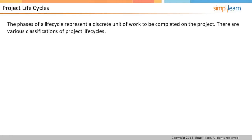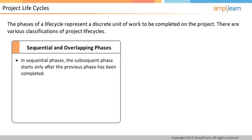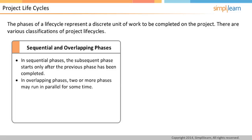A lifecycle is composed of phases. Each phase represents a discrete unit of work required to be done on the project. There are different ways of classifying project lifecycles. Let us first discuss sequential versus overlapping lifecycle. In sequential phases, the subsequent phase starts only after the previous phase has been completed, whereas in overlapping phases, two or more phases may run in parallel for some time. This could help fast-tracking and compressing the amount of time required.